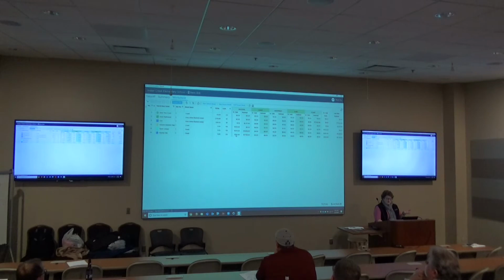Those are my unit prices for material. I can add in for labor, equipment, subs, other. I can change it up at this point, or I can just have that be my generic ballpark figure that is in my library that I can call on for my preliminary estimates. And I can kind of figure out where we are with this job right now. Is this something I'm going forward with?